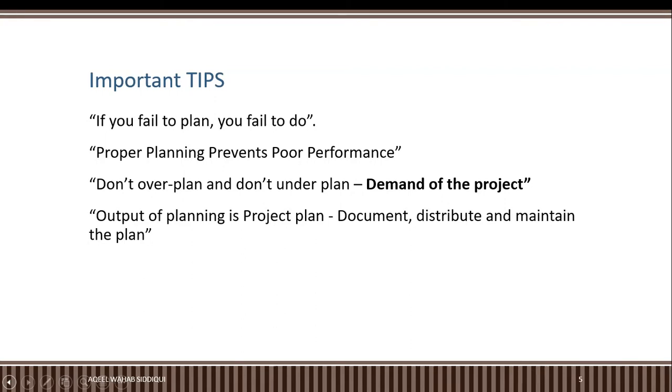If anything is missing or ambiguous, for example, you do your work to achieve your objectives. If any requirement received from a project stakeholder does not meet any project objective given in the project charter, simply what we do is eliminate that requirement.